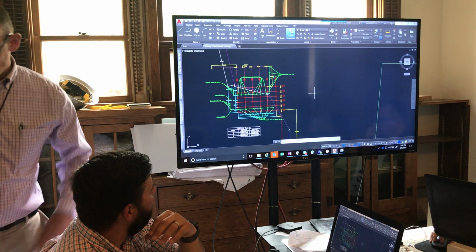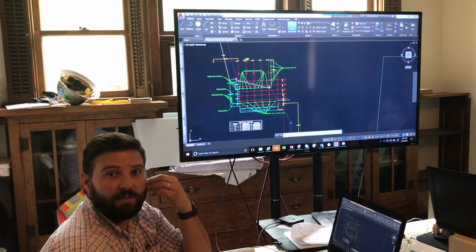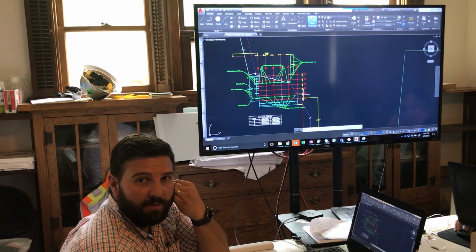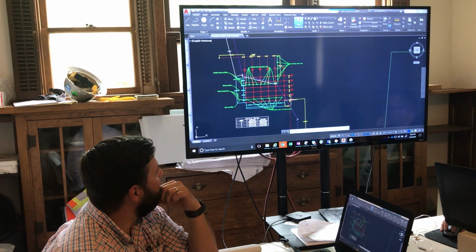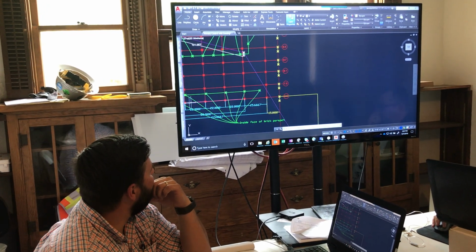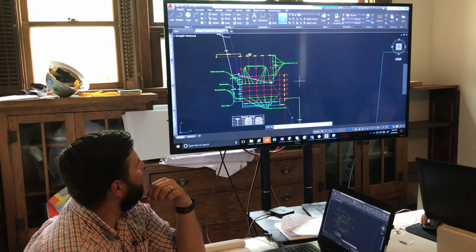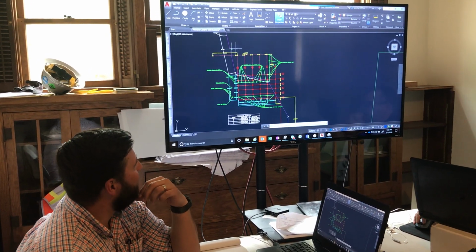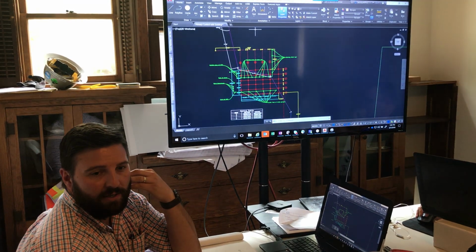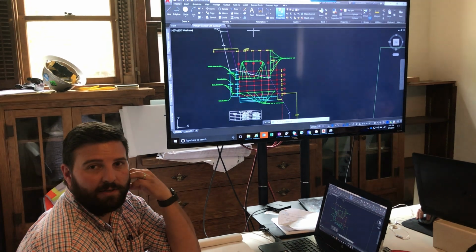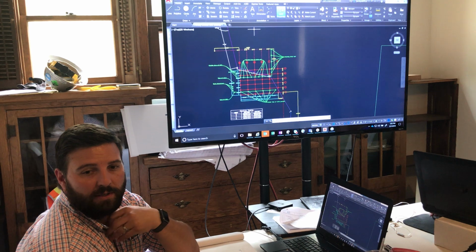One of the things we're planning on using it for is allowing us to check edge of slab as well. Check for alignment with it, because if we're able to turn 90 degrees, we'll be able to check exactly where the edge of slab is going to be, which should be this line right up in here. So as you get into this more, and most people have some basic understanding of AutoCAD, this is very basic for your layout. It's pretty easy to check with a couple of tips here and there. Anyone can really become pretty proficient at doing this at their own computer.